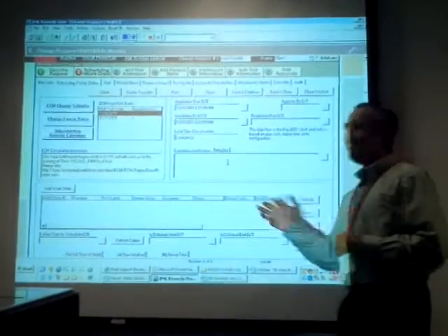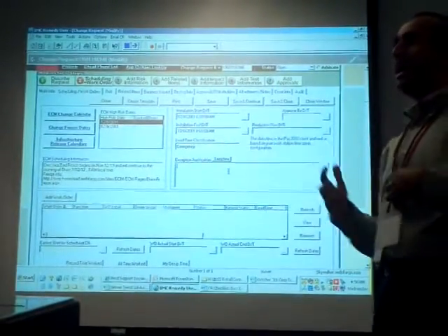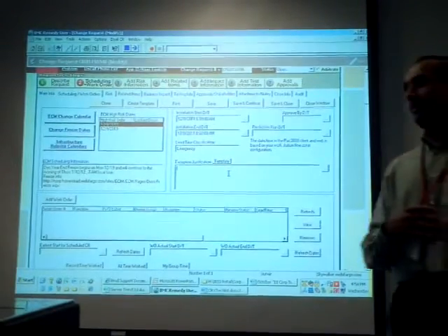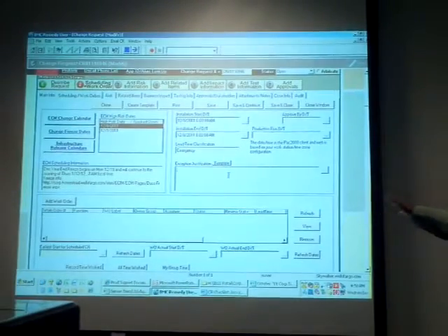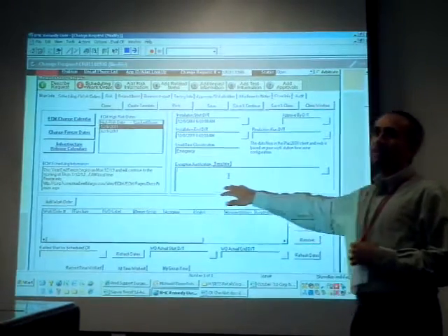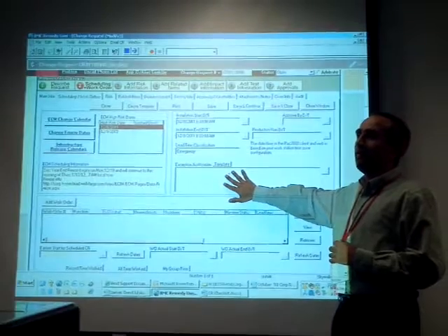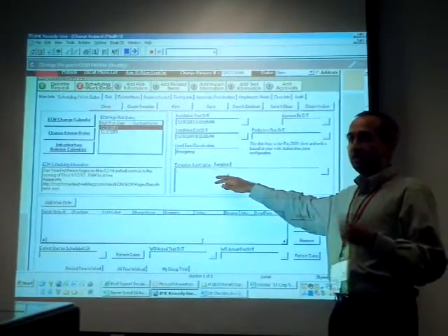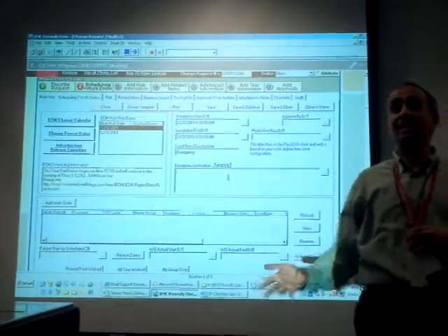Now, every team has their own lead time requirements. Some teams will have 7 days, some will have 5. If this is an emergency, those lead times don't apply, correct? That's what emergency is. You want that change implemented immediately. Lead times don't apply in that case. But what you have to document here is the justification. What happened? Why are you doing an emergency? Document why it is an emergency, for example, echo issue number, the system is down and having application impact, and this needs to be recovered immediately, or this change has to be deployed.